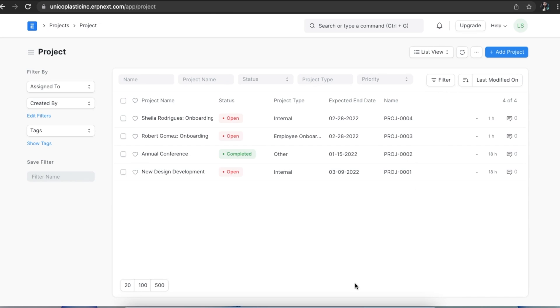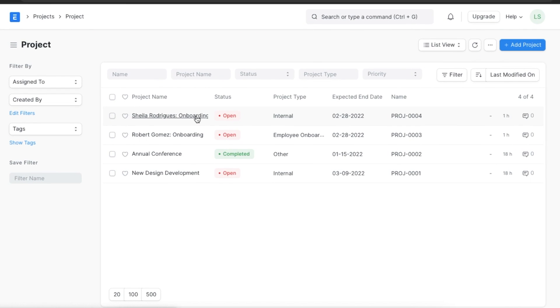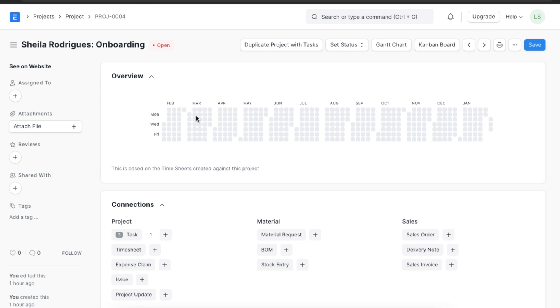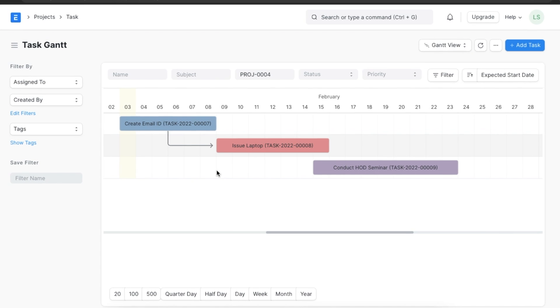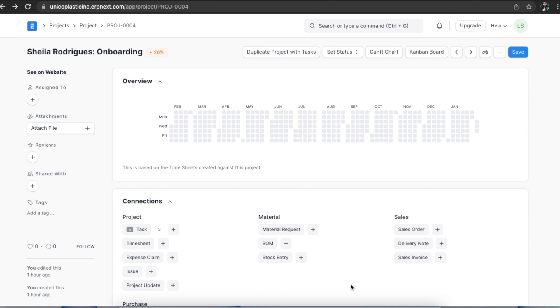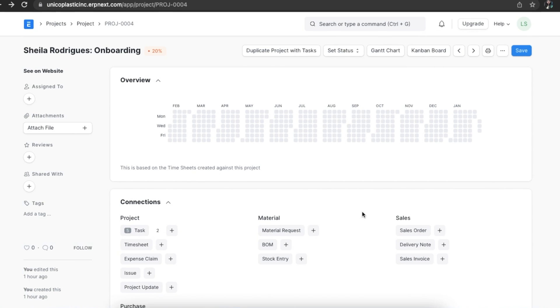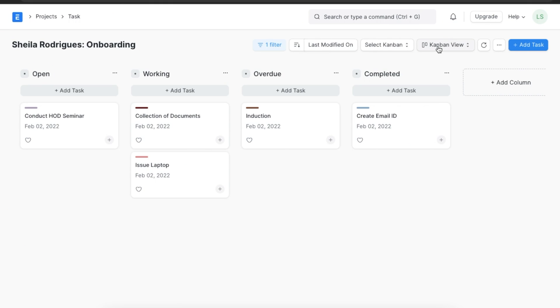Once we have created a project, we can view the tasks in the project in different ways to suit different needs. The first one we can explore is the Gantt chart view. Open a project and click on Gantt chart. A Gantt chart shows how tasks are linked to each other and shows the sequence in which they need to be completed based on their start and end dates. The second one is the Kanban view. This view shows tasks in a segregated board with each column representing an execution stage.